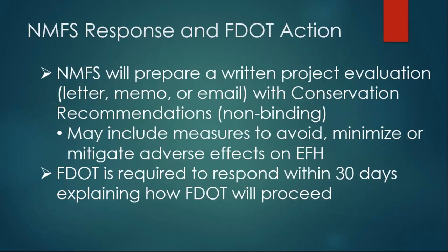The National Marine Fisheries will provide a response. The National Marine Fisheries will prepare a written project evaluation. It could be a letter, memo, or email with conservation recommendations, which are non-binding. It may also include measures to avoid, minimize, or mitigate adverse effects on EFH. FDOT is required to respond within 30 days, explaining how FDOT will proceed.